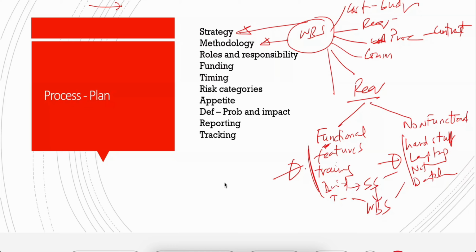So you can start the risk analysis at this stage even, and then go into your scope statement, start scoping what's in, what's out. That's what scoping is, right? But what's in, what's out. And I'm going to focus on the in, and then you do your breakdown, decompose here. You do your decompose here, and then you finish your risk analysis.